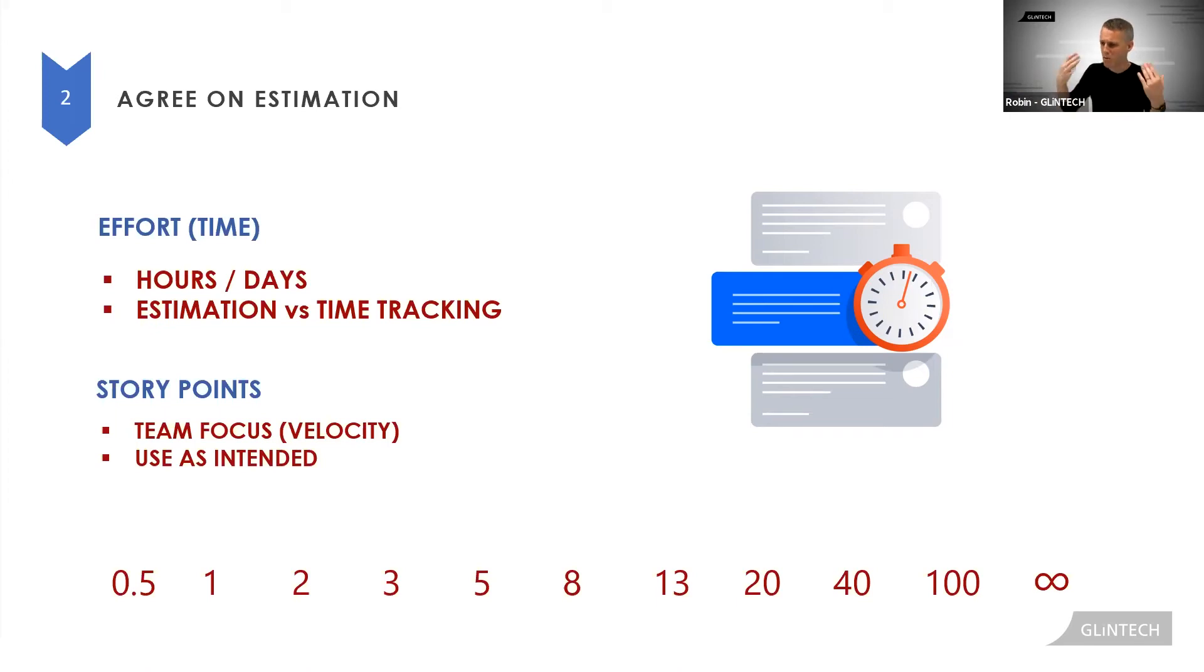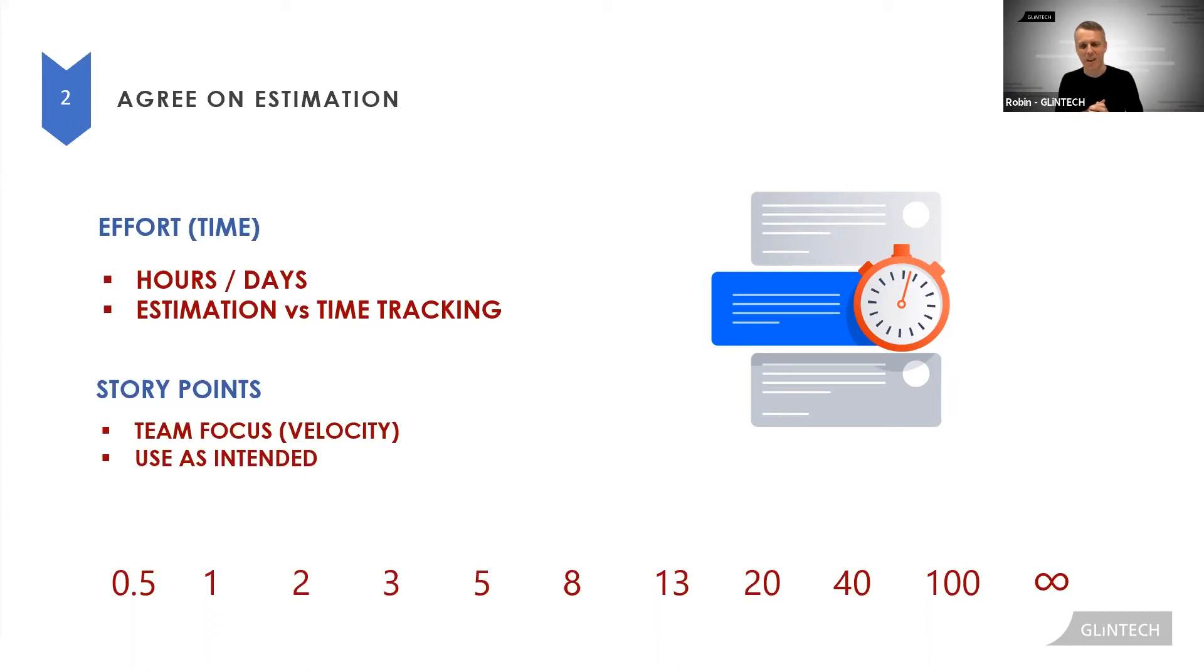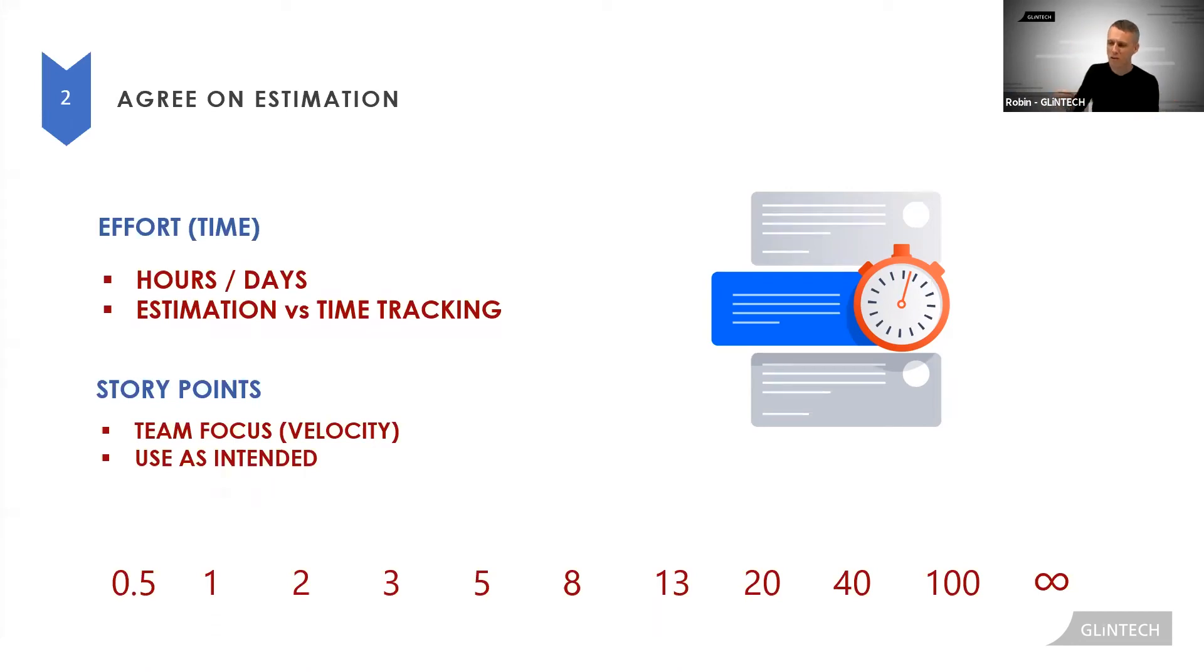Also, as humans, we're dreadful at estimating time. We consistently underestimate. Interestingly, even if we're told we're underestimating, we still underestimate in time. So we're much better at comparing things and that's what points is all about. Just use them as they're intended.